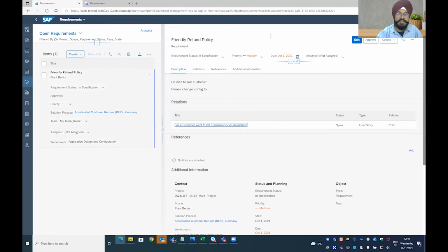Now let's understand how approval works. So I can click on this approve and basically indicate that this requirement is blessed by the PMO office. We have budget for it. It's good to proceed, things like that. But how it works is you don't really need approval. This is an optional step. So this is also coming from customer feedback that sometimes approvals are not required. So you can change the status even without approval. So it depends on your use case in your organization.